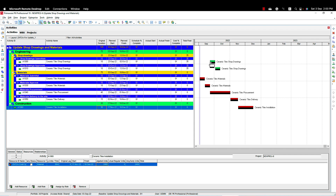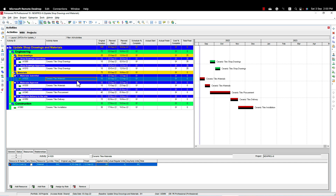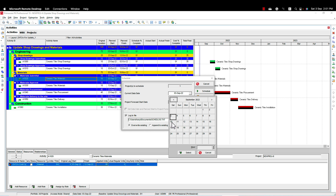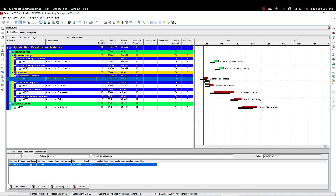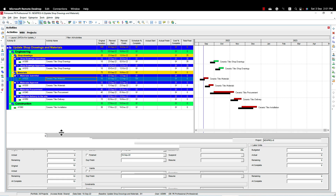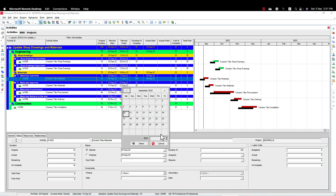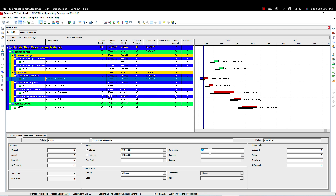When we update this schedule, let's say our data date is 3rd September 2022. The first update is 10th September — on 10th September we submitted the ceramic tiles materials. In that case we update our schedule and put the start date as 3rd September. But here we will not put 100 percent, because as our colleague said we might get 'revise and resubmit.' So normally I'm putting 50 percent only and I wait until I receive the reply from the consultant.